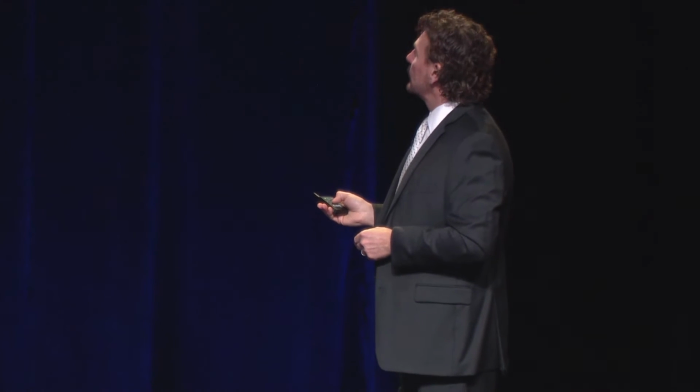The other really large factor of why projects fail, and it was mentioned on my earlier graph, was lack of sponsorship. If you have people that come to the kickoff meeting, they're all for it, and you don't see them and they disappear, that's not active and visible sponsorship. That's not commitment. That's not people dealing with freeing up the key resources, like you said. If you're missing requirements, it's because they haven't freed up the right people.